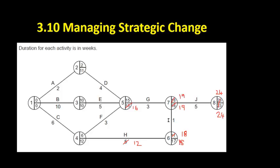Activity H has to finish by week 18 to allow us to do activity I and complete the project on time. That 18 minus 12 to give us the latest finish time for activity C. It's going to be 6.